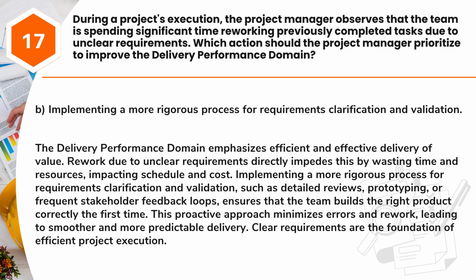Implementing a more rigorous process for requirements clarification and validation, such as detailed reviews, prototyping, or frequent stakeholder feedback loops, ensures that the team builds the right product correctly the first time. This proactive approach minimizes errors and rework, leading to smoother and more predictable delivery. Clear requirements are the foundation of efficient project execution.